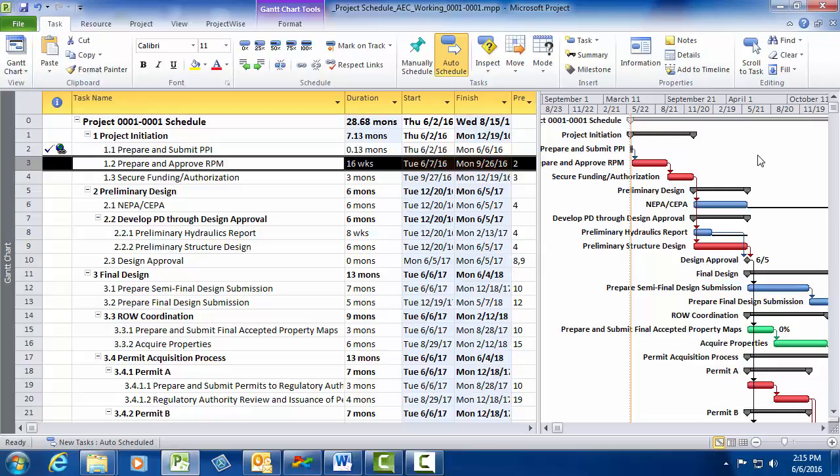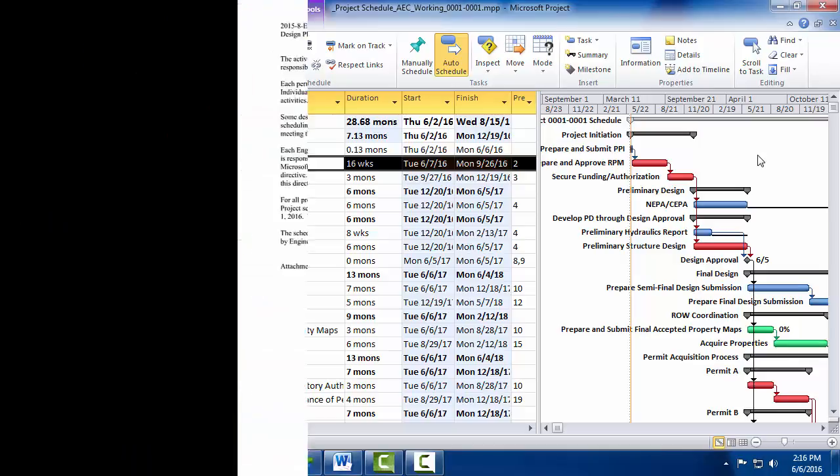So to reiterate, I recommend setting up your schedule by using the duration cell, not the start or finish date cells. By setting up task durations in this manner, you can then use the actual start and actual finish date columns to better track your schedule during the life of your project. I also highly recommend using hyperlinks to track important documents for future reference.